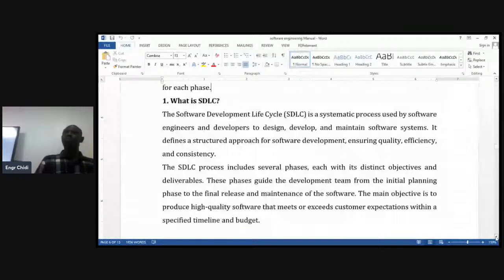So what you do is to find out whether this person really needs a mobile app or is talking about software that he will be able to use with the phone, irrespective of where it is. If that is the case, you do it on web, which is cheaper. Something that is within budget is important. You don't need to do your work too expensively. Even if you are doing it for Dangote, he will appreciate it when he spends less. Are you following? So you need to make those requirement analyses to be sure that what you're doing is within budget.